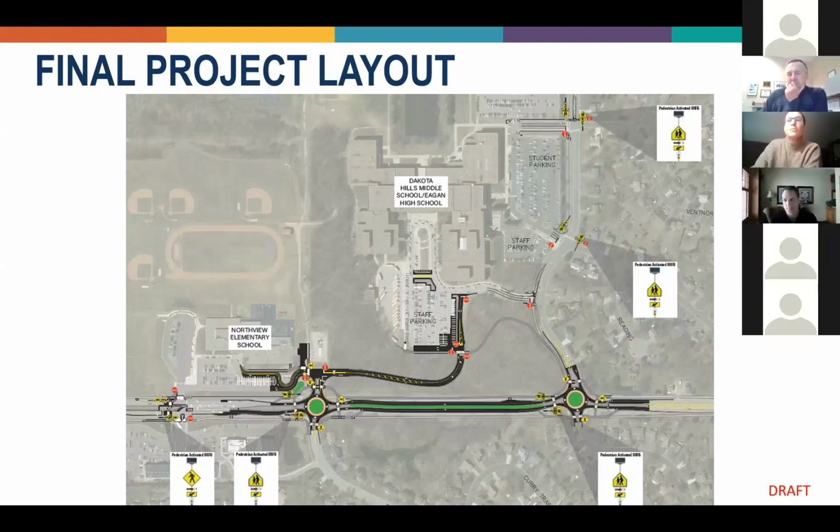Sure. So the authorized speed limit in Diffley today is 45 miles an hour. Because the new road conditions are creating an environment for a slower speed, the intent is to wait to post the new authorized speed until the state comes through and gives us that speed. I don't see a benefit of reposting the 45 when that is no longer the applicable condition to drive the roadway. So we're going to work with MnDOT and look to get the speed zone authorization process done as close to the road opening as we can, and then we can post the speed signs.